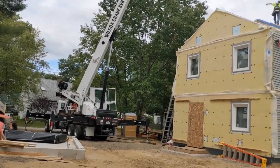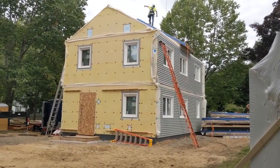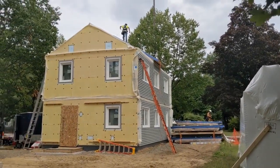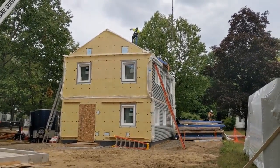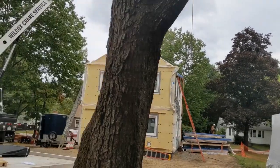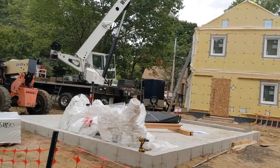In fact, this morning there was just the slab foundation here on site, with all the panel bundles staged adjacent to that slab foundation. And now it's about 4 o'clock in the afternoon, and the crew is on track to have all of the panels installed for this house. The prefabricated components of the garage here will be assembled tomorrow.